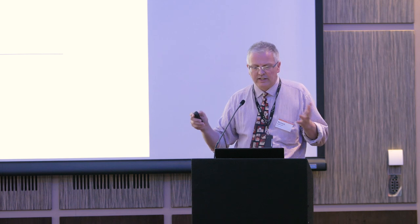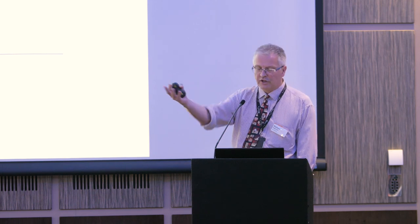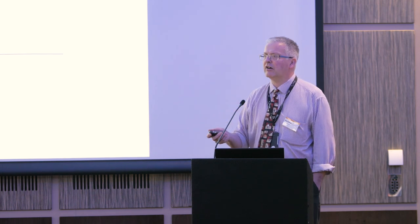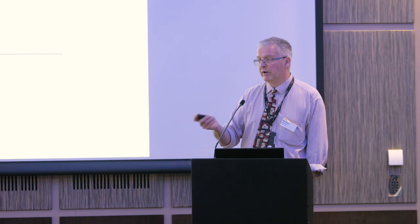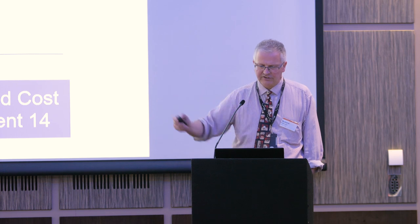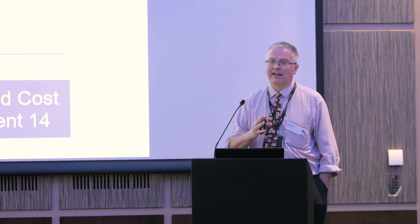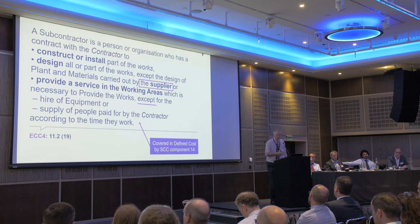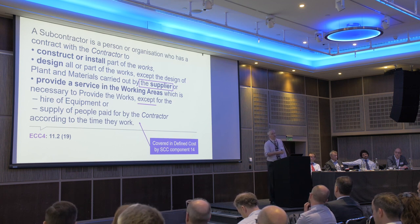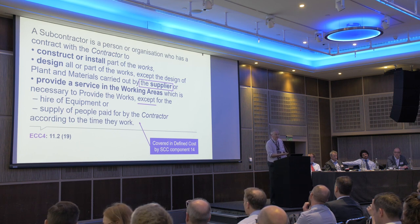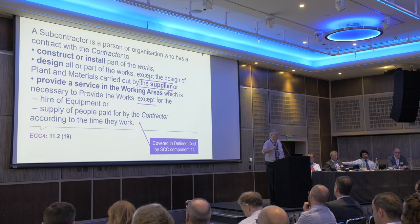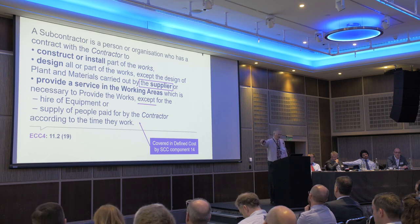It's not going to be totally simple. But what they have done in NEC4 is chop out 'hired equipment and people paid by the contractor.' The last bit is directly linked to schedule of cost components item 14 — we're not going to pay you as a subcontractor; we're going to pay those people employed according to the time they work.